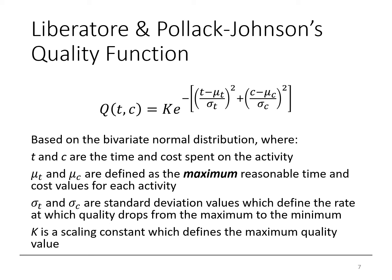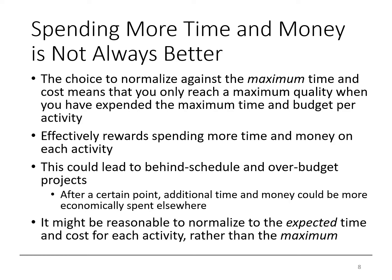Based on these criteria, Liberatore and Pollack-Johnson created a quality function based on the bivariate normal distribution. This function is based on the time and cost spent on the activity, the maximum reasonable time and cost values for each activity, the standard deviations which define the rate at which quality drops from a maximum to a minimum, and a scaling constant which defines the maximum quality value. Their quality function normalizes against the maximum time and cost for each activity, meaning you can only reach the maximum quality once you've expended the maximum time and budget per activity.